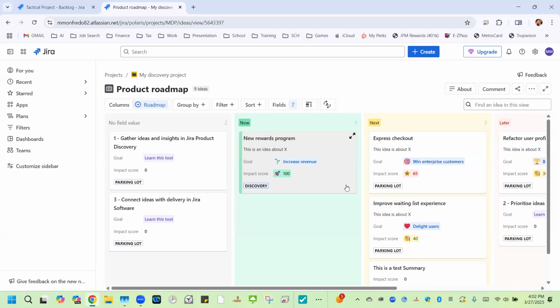One case study of this could be that the visual bar does not depict the accurate representation of the work being done around this idea. And maybe that's because the teams are actually further along and they haven't been updating their epics or stories in Jira. Or maybe it's because they're further along and they actually haven't put in their stories or they haven't linked it to an epic.